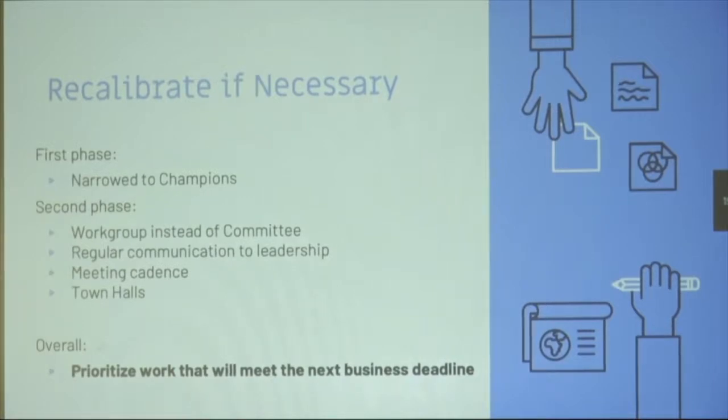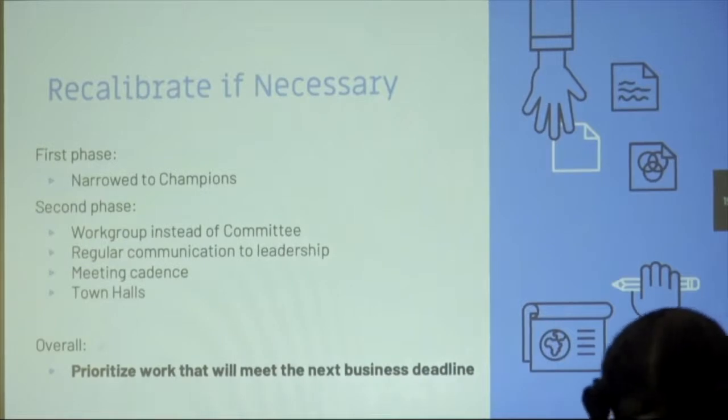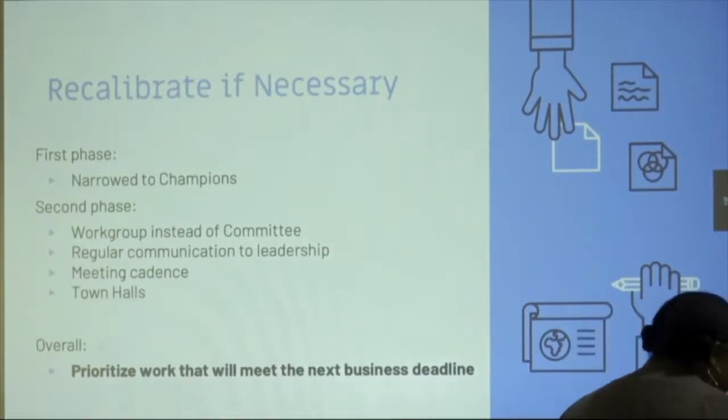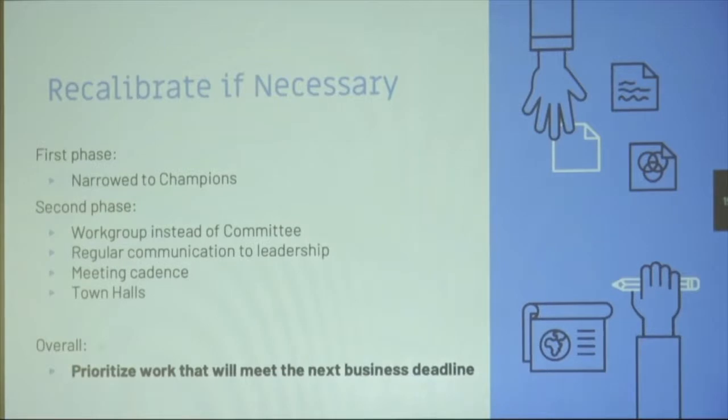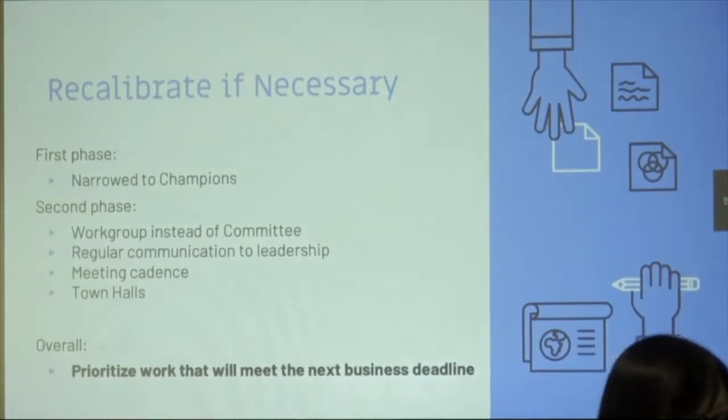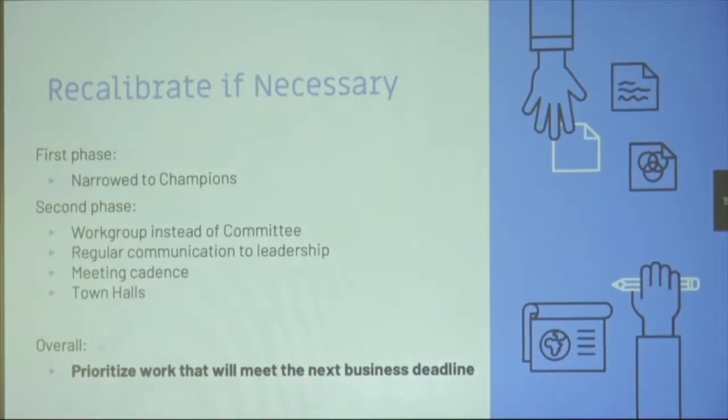So for the second phase of development, we had a work group instead of a committee. I started establishing a regular communication timeline to leadership so that it wasn't just 30 people in a committee who go off and then their boss is like, what's this committee you're going to? You're always going to the committee, but I never see anything delivered. Now there was a mechanism to deliver that information back to the leadership and tell them, this is what we've been accomplishing. These are the incremental pieces of work that we've been doing. And really keeping that meeting cadence consistent helps to keep the trust, hold the trust, sort of bring that trust to the leadership level so that they also trusted us and knew that if they had a question, it would be answered and that it was happening in a cadence that was regular